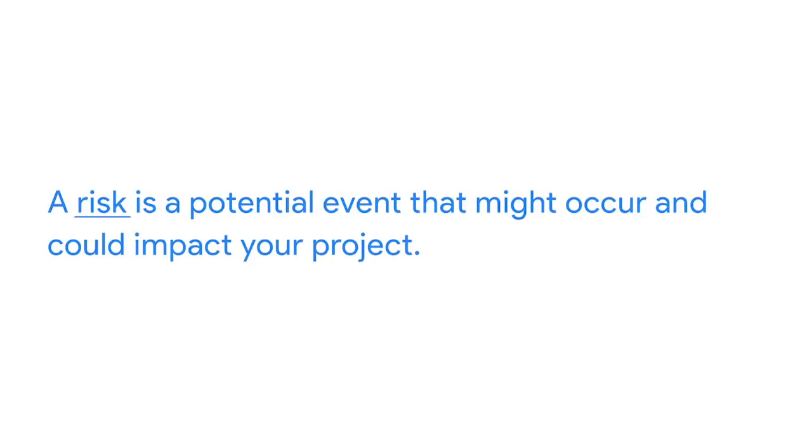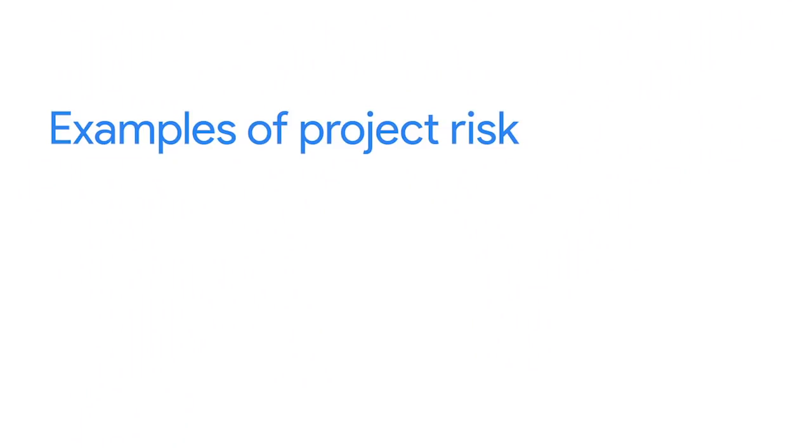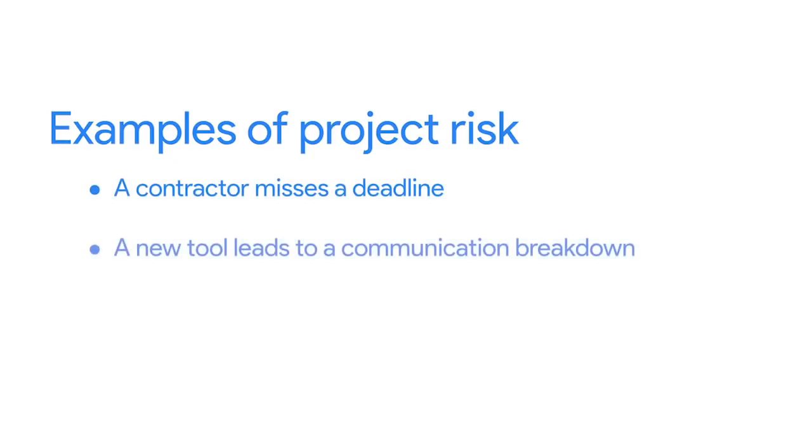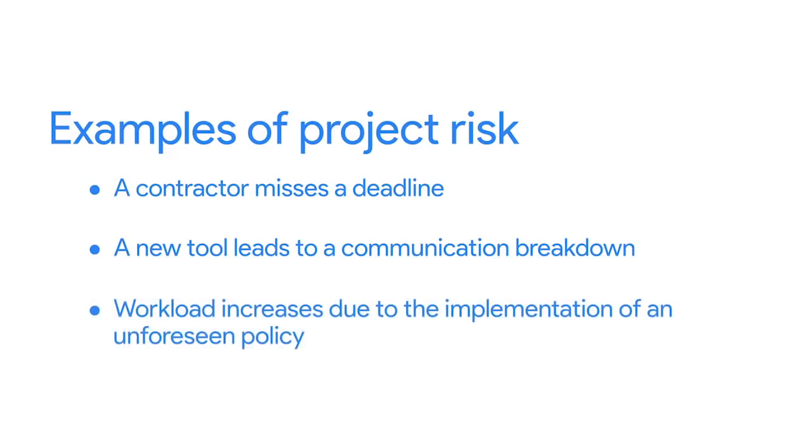Welcome back. In an earlier video, we learned about how to identify risks when planning projects. In this module, we'll learn why risks and changes might occur during a project and how that can impact your project's scope. A risk is a potential event that might occur and could impact your project. These might not be events that will definitely happen, but because there's a possibility that they could happen, it's your responsibility as a project manager to identify and plan for those risks. A project risk might be a contractor missing a deadline, introducing a tool that may lead to communication breakdown, or unexpected additional work because of an unforeseen policy being put in place.